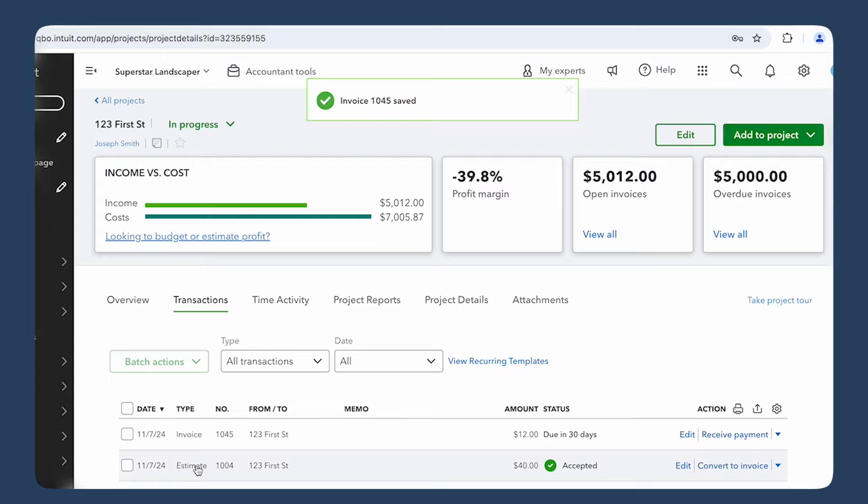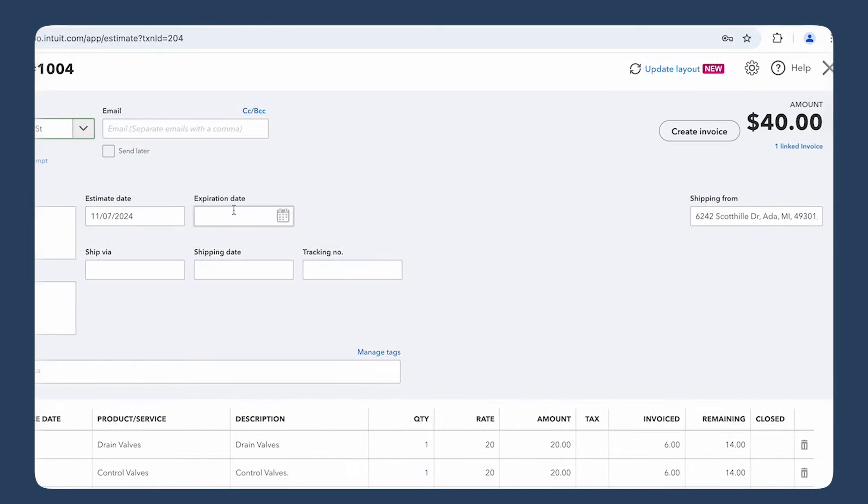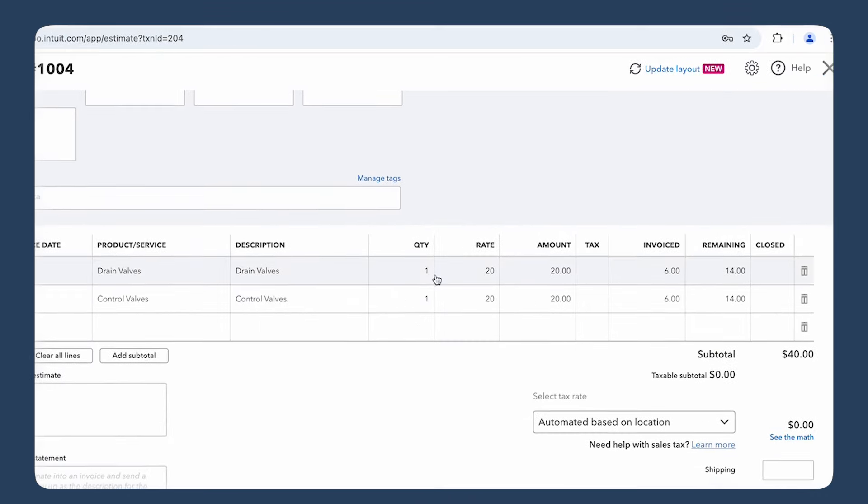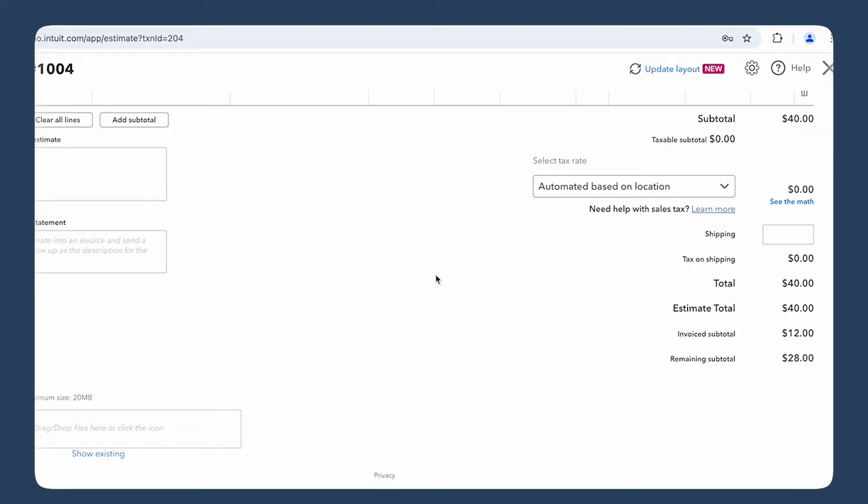When you are ready to invoice your customer again, you would need to go back to the estimate and repeat all the steps we have just discussed. And the bonus is that on the estimate you can clearly see the progress of your invoicing—how much has been invoiced and what items are still outstanding. For those who have a lot of projects going on at the same time, it is very important not to keep everything in your head and have a trail on each project. Progress invoicing helps you get paid as the job progresses and it makes sure you're not sitting there wondering when the next check's coming in.